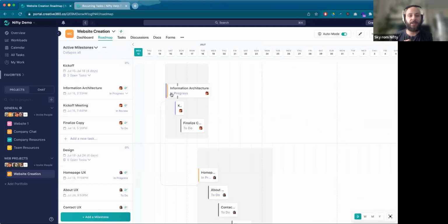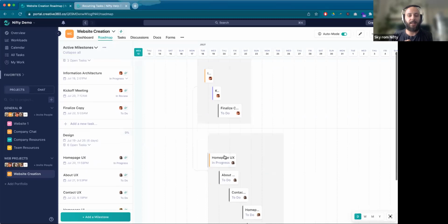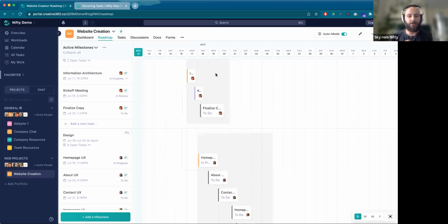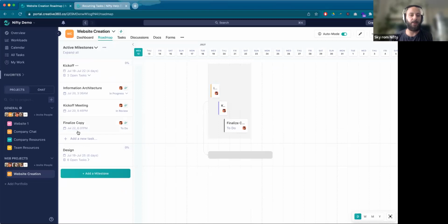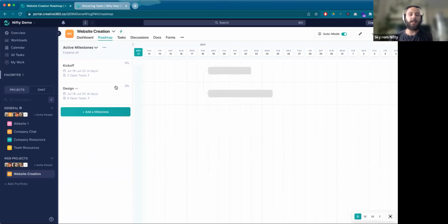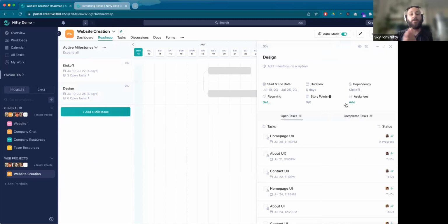Now when I shift this first task, everything is going to shift within it, right? So it's really a great way of managing our downstream date changes as well with those dependencies. It's going to react into the next milestone. That milestone dependency we can think of as, in auto mode, keep cascading into that next milestone. So it pushes all of our task dates into the future.